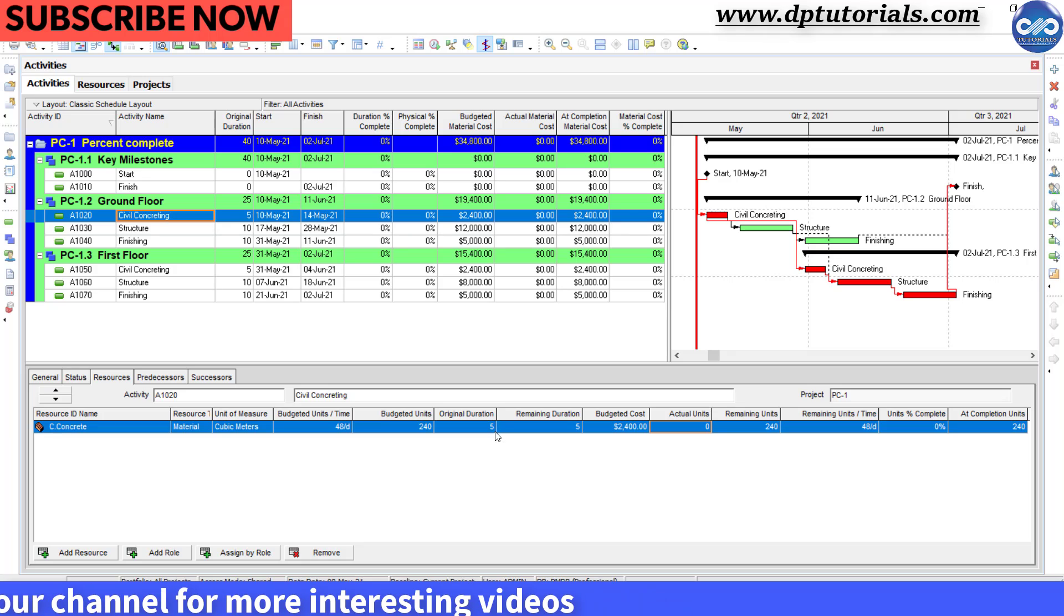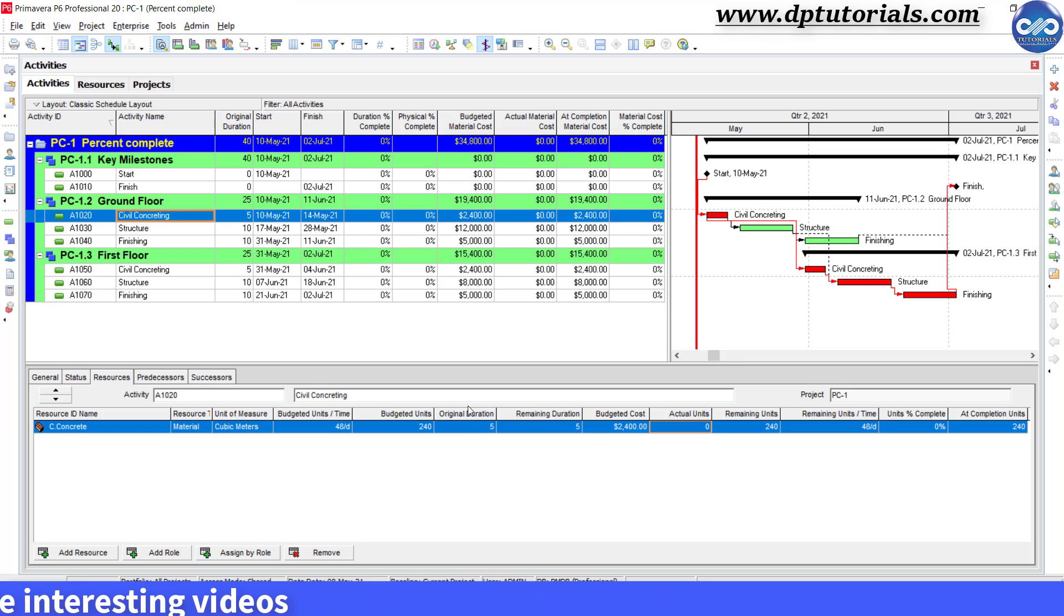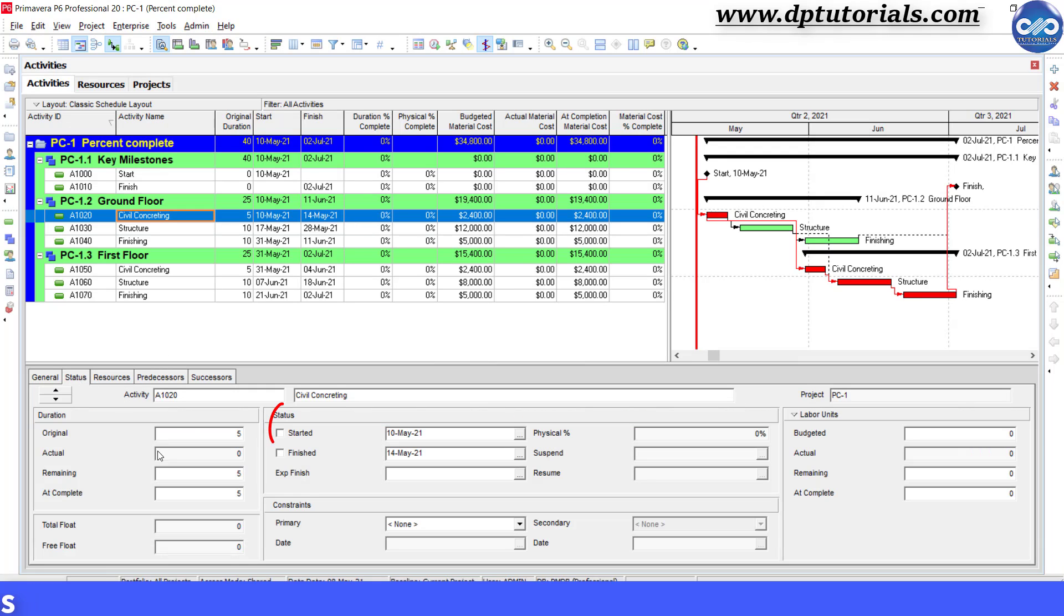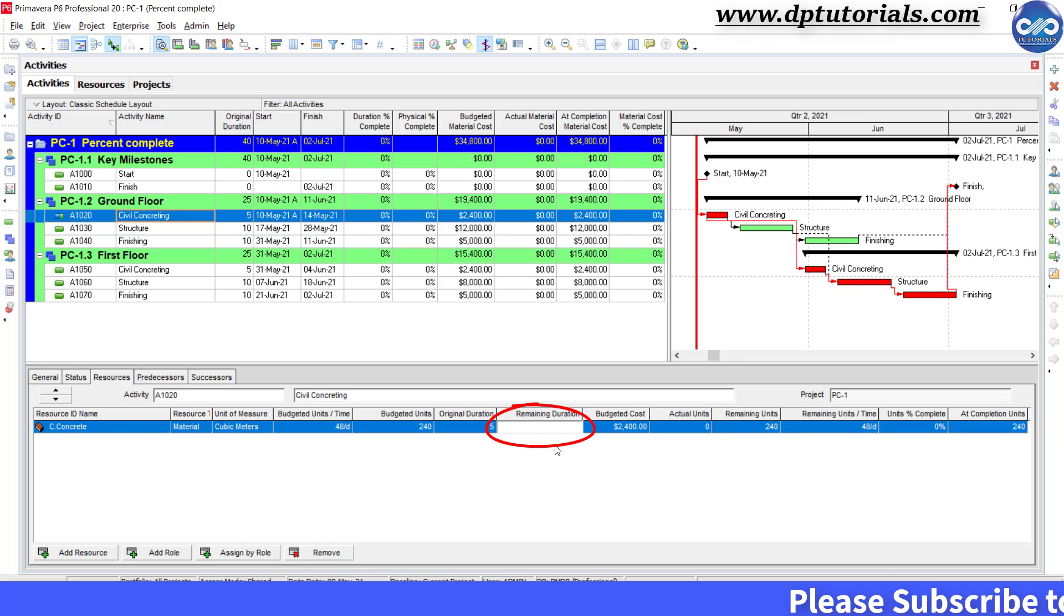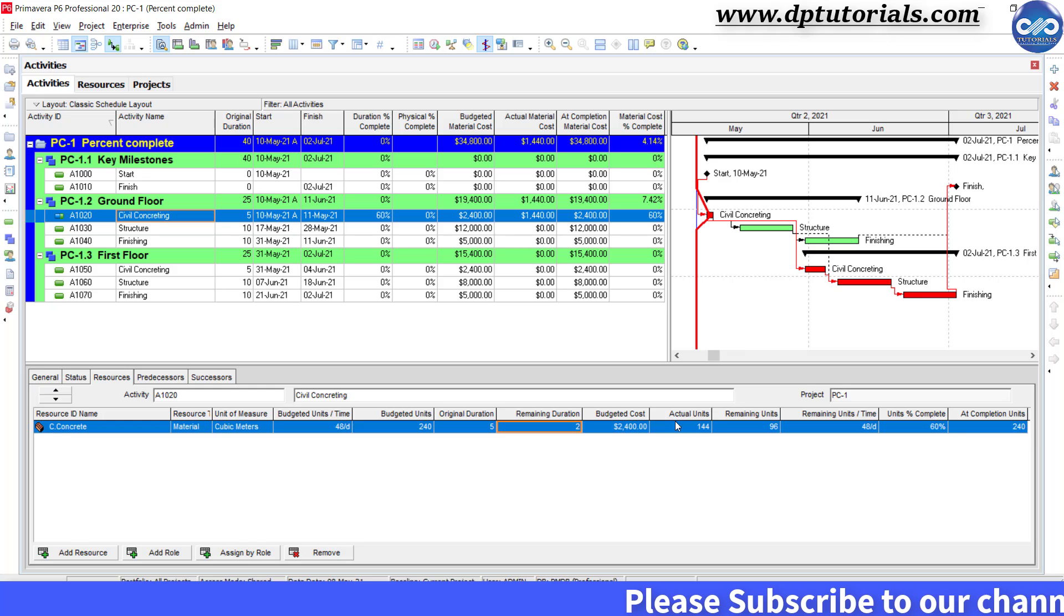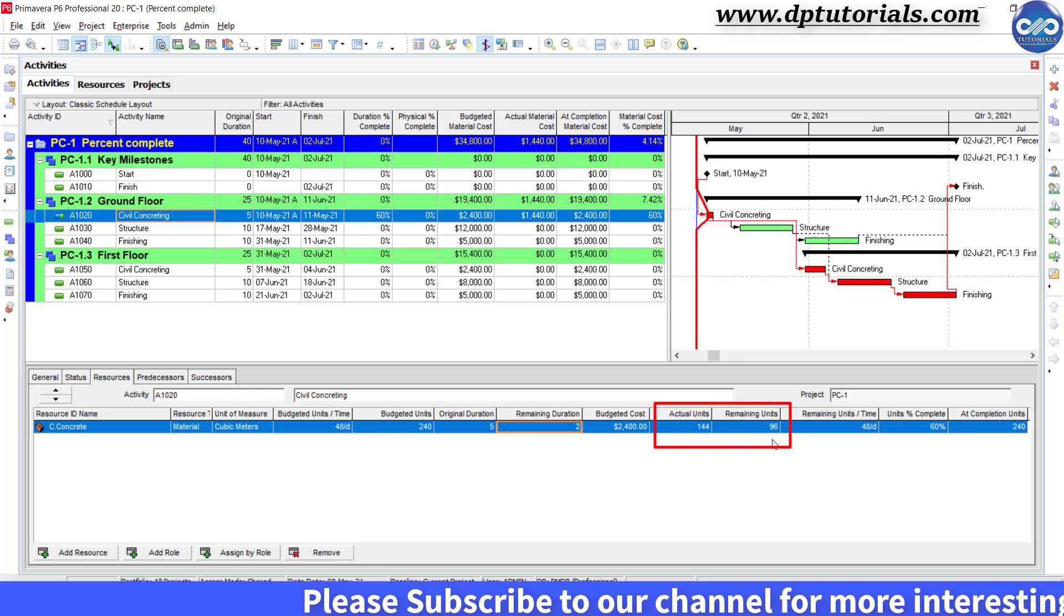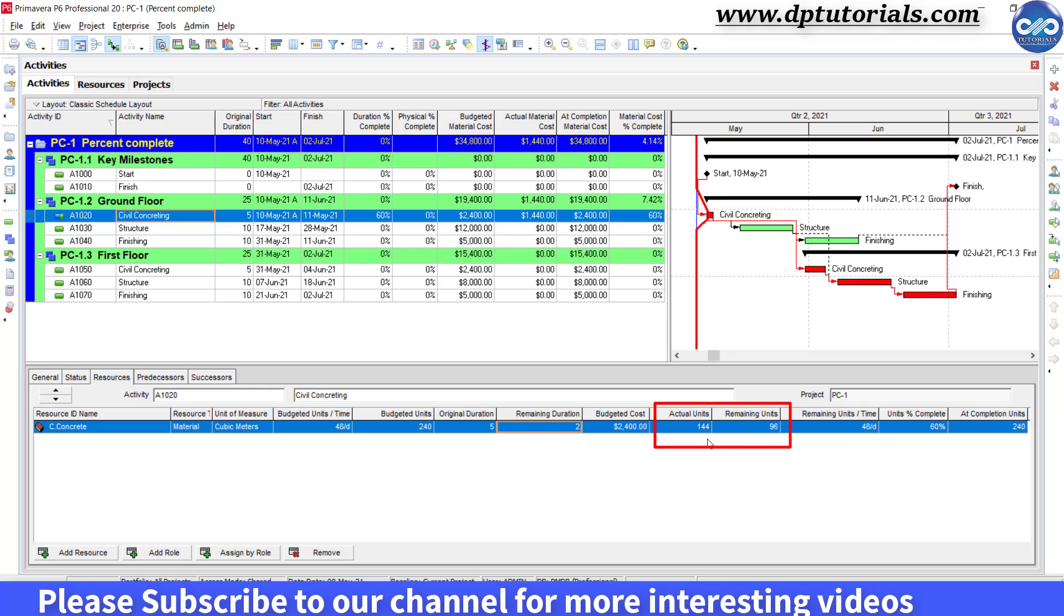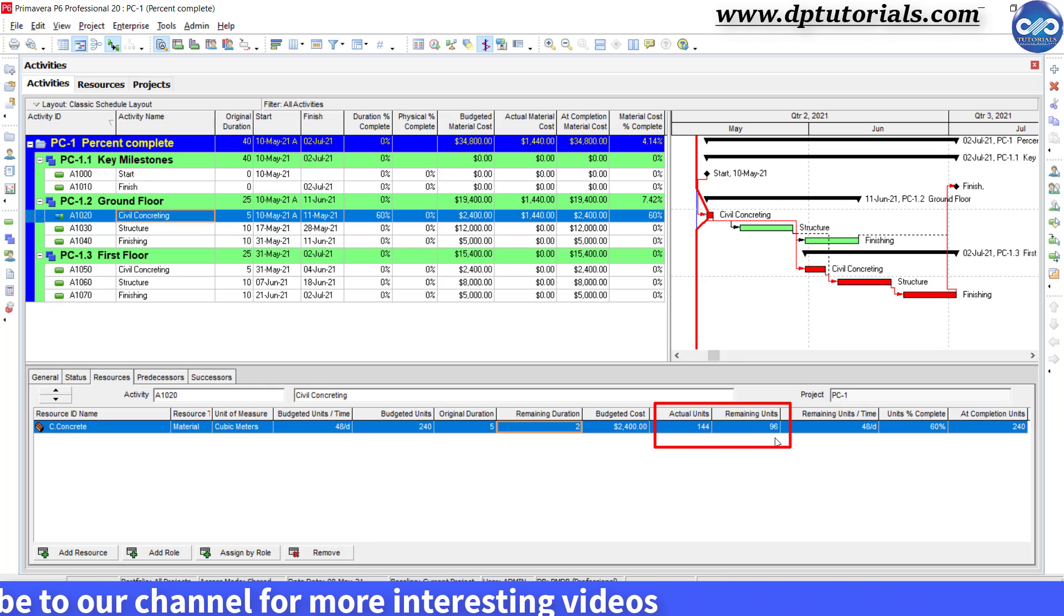Now after one week of progress, say we are updating the schedule. I want to go to status tab and check the start date as 10th May and in the resources tab, mention the remaining days as 2 days. Then, Primavera will automatically calculate the actual units and remaining units as 144 and 96 cubic meter respectively.